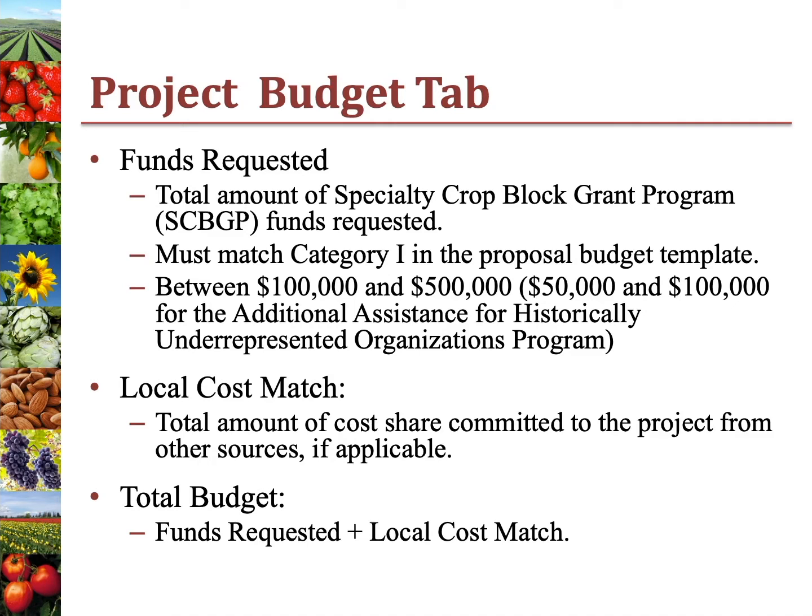For local cost match, estimate the amount of cost share committed to your project. Cost share includes matching funds and in-kind contributions. To clarify the difference, matching funds refers to a dollar amount committed to your project from a source other than SCBGP. And in-kind contribution is the estimated dollar value of any time, property, or supplies donated to your project. An example of an in-kind contribution would be someone working on your project that is not paid. You would estimate the value of their in-kind contribution based on what they would typically be paid for similar work.